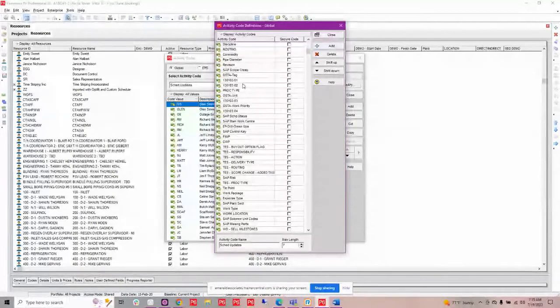That can be a problem, especially at your global level, because you don't want these types of codes to be just brought in and slammed into your database when you have perhaps some reporting that you do on particular codes and things like that. You want to keep these clean, so in your database you have a very controlled code library that is important to just your organization. Ideally, you'd want to push those down to the project level in this case, so that you could keep those contained.